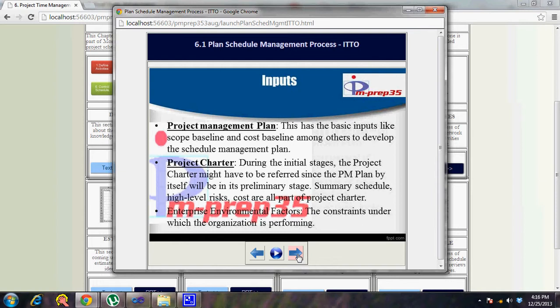The project management plan input for this process includes basic inputs like scope baseline and cost baseline, among others, to develop the schedule management plan. The schedule management plan is built based on the scope baseline and cost baseline. Based on the available cost baseline or high-level cost from the project charter, you decide the plan, since different costs or scope levels lead to different approaches for managing time and resources.